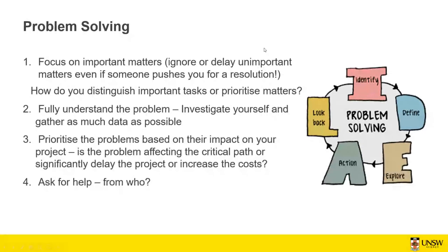Okay, so as you can see, during monitoring and controlling, you need to do a lot of problem solving. First of all, you need to focus on important matters. Ignore or delay unimportant matters, even if someone pushes you for a resolution. Only focus on things that are important, perhaps part of the critical path or affecting your schedule and budget. Those are the important things.